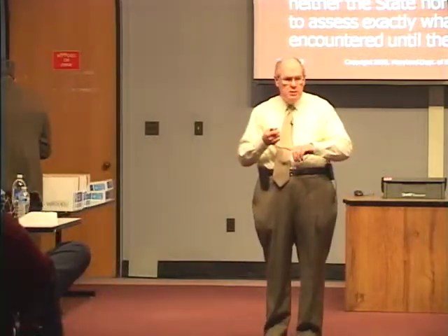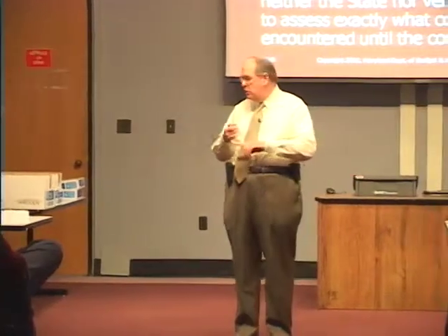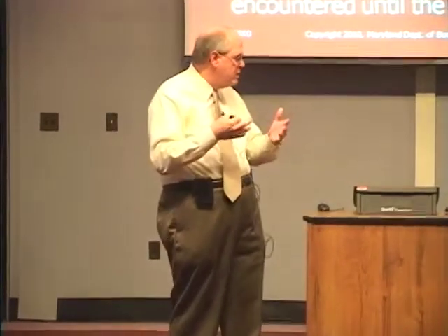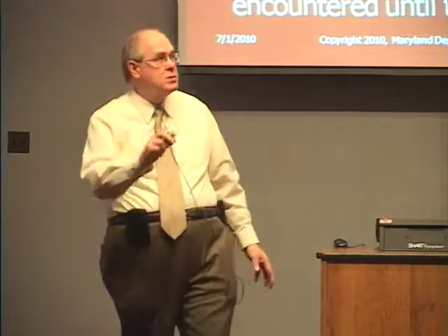CPI is done both regionally, like we fall under the Washington, Baltimore, something metropolitan, and then you have the all prices CPI, and there are various component prices, such as when we do medical contracts, the tie-in is not to the entire CPI, it's the medical component of the CPI, which is always higher than the CPI itself. So that's an illustration. If you're doing producer price index, there's one specifically for fuel. Fuel is going to be more volatile than most other things on the producer price index. So the main thing is you've got to nail down what index you're talking about and what location and what component and things of this nature.